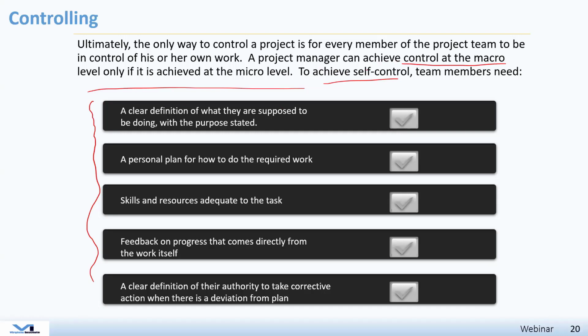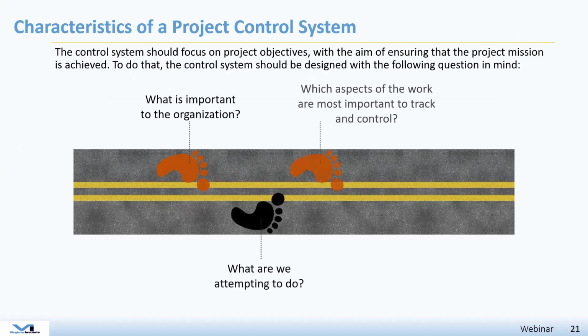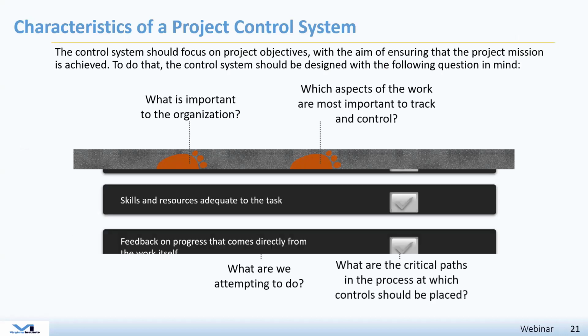So again, controlling is a function in project management that will require the engagement of your left brain, because basically you will develop key performance indicators such as schedule variance, cost variance, some lagging key performance indicators to talk about the performance of your project. But you will also need to develop some leading KPIs that have to do with your project forecasting and what would happen in the future if you are working on the same track. So all of this will require that you are engaged with your left brain, because you will deal with numbers and KPIs and control systems and such.